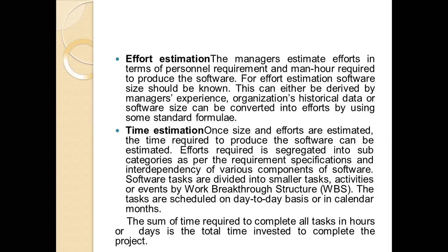Effort estimation means how much effort you are putting in. The employees, the human resources, every stakeholder involved in the project is putting in effort, and this is estimated before actual project development begins. The manager estimates effort in terms of personnel requirement and man-hours required to produce the software. From the personnel requirement, we know the employees we require for developing a particular thing. So we measure this effort in the form of man-hours: how many persons, how many hours they have worked.